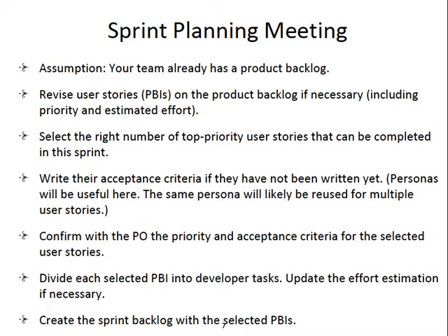And then, so what tasks do you need? Well, you may have one task. One task is to create a data table holding the booking information. Okay, and then there may be another task, which is to create the user interface, the user interface for someone to select the computer or enter their personal information. So that's another developer task.